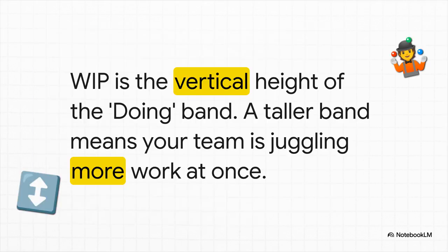And on the chart, you can see your team's WIP instantly. It's just the vertical height of that middle doing band at any point in time. If that band is getting taller and taller, it's a clear sign you're taking on more and more work at once.